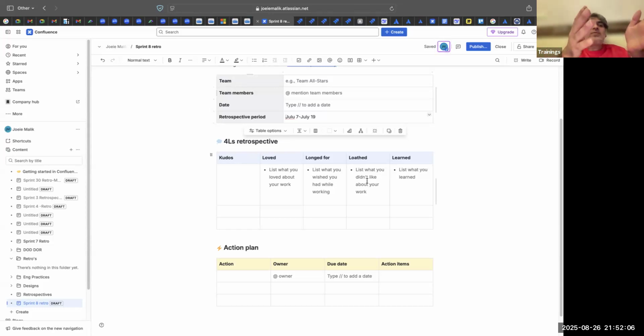It is about the tools which we are using and the processes which we have. For example, the process is that we are only closing critical bugs. We are not closing medium priority bugs. It turns out medium priority bugs are causing a lot of issues in production. So let's start closing the medium priority bugs also. This is only a process. We have to look into processes, tools, and the general relationships. Everybody is respectful of each other. That kind of discussion.